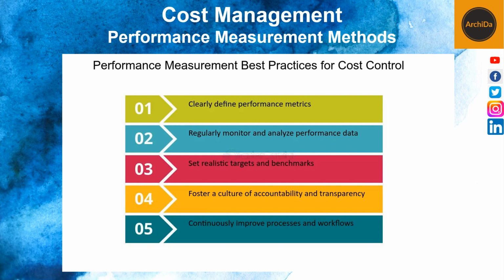Performance measurement methods. You have to establish how the cost performance will be measured to see if you're meeting the goals and expectations of the project. To do so, you'll need a cost tracking system and earned value management or EVM techniques. Performance measurement is the monitoring of budgets or targets that gain actual results to establish how well the project and its manpower are functioning as a whole and as individuals.